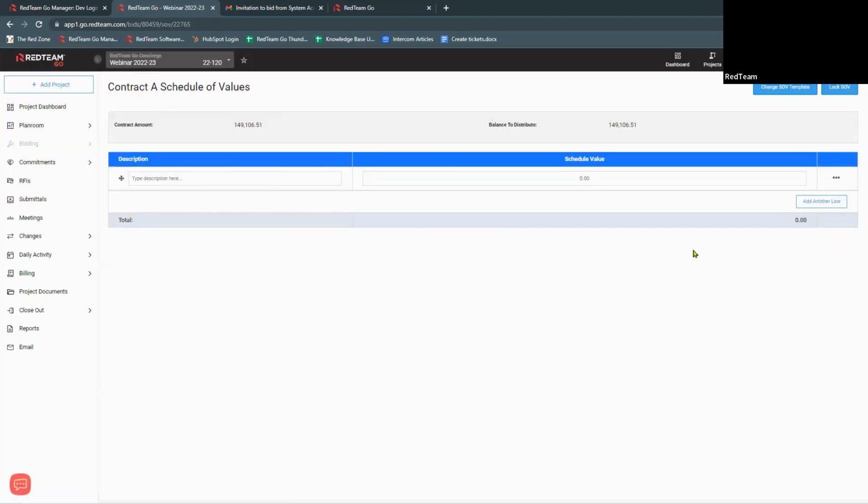With the custom unrestricted, it's going to look very similar, but it's not going to pull in items like our purchase orders and our field purchase orders and expenses, because it doesn't have a line item or a cost code to actually charge those against when you do this in a schedule of values this way. Just going to use the same ones.